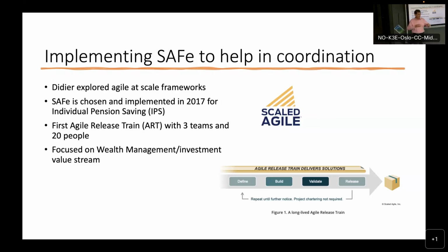Pension 3 was quite funny. The law was done, but in Norway there is a difference between voting and passing a law, and then the application of the law, the directives. The people spend the whole year after the law is passed writing how you will apply it. Basically, the government was telling us how to implement the whole thing while we were coding. So it was quite tough, because everything could change. We didn't know. We had to guess what the final product could look like. So we were coding, they were issuing new directives, and we had to redo or change things.